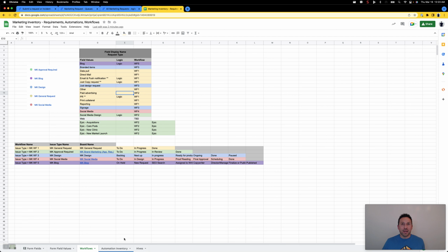Obviously, we had some serious time constraints. The time constraints were that we were not wanting to renew the license for Asana. And we also had people going on maternity leave. And between those two things, we had 90 days to get this done. And that included moving all of the existing requests from Asana to Jira, training, and then designing, developing, and building out this Jira project with a lot of requirements.